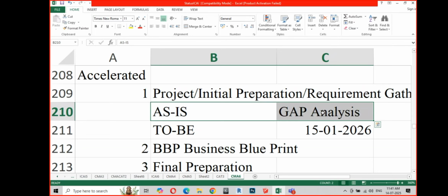The points are actually written down. And the most critical thing is both the parties sign on each and every document in your blueprint. Yes, both the companies sign on each and every page of this particular document.